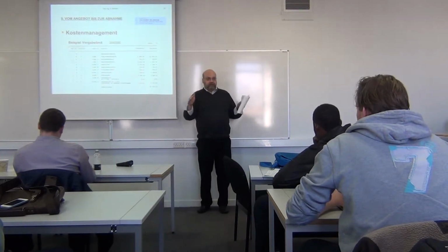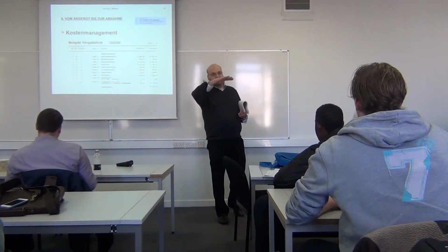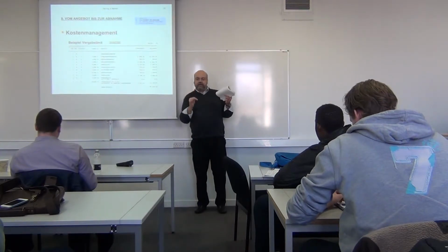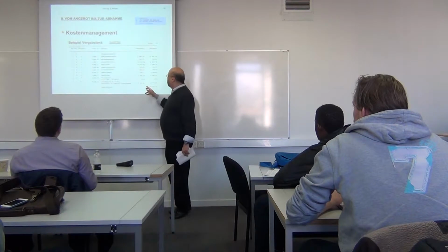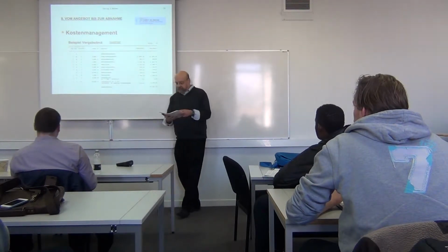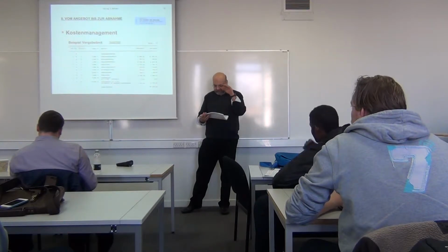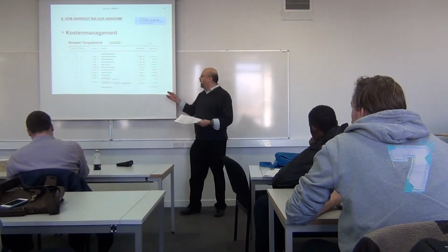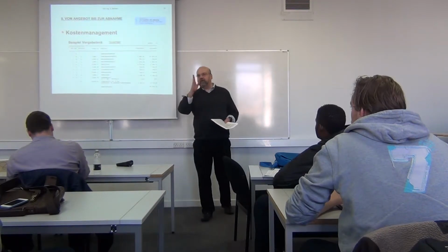I have my sum, I know, 35 million, so for subcontractors I have 30 million, let's say. I have to divide it for the different trades, and then I have to know exactly, for example, for this connecting bridge out of steel, bearing brackets and profiled steel and many other things, I have around 60,000 euros for this work.